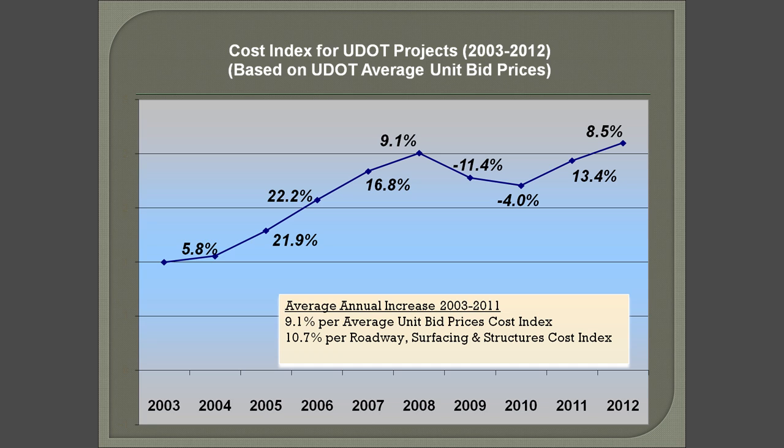And you can see through 2003 to 2008 that the costs were going up, and 22%. If you don't have 22% contingency in your project, you're not going to be able to award it, right? You're going to have to go to the project manager, or the project manager's going to have to go to his bosses and cry for more money, and that's never fun. Then you have to go to commission, and they're always asking, well, why didn't you figure that out?